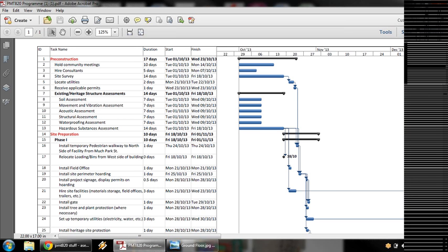Okay. So in terms of the construction method statement, we've split up all of the work. Basically, I'm going to be handling most of the writing, whereas Puya and Farzan will be drawing up diagrams. Farzan has also completed the machinery list that Puya started. This list details what we're using on site, how it's going to be used, when it's going to be available on site, and it's going to tie right into the construction method statement.